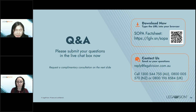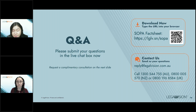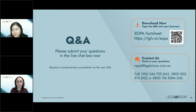Question: Does a construction contract that includes both commercial and residential builds fall under SOPA? Yes — except when the principal is an owner-builder, in which case it goes through NCAT, the tribunal process under the Home Building Act.